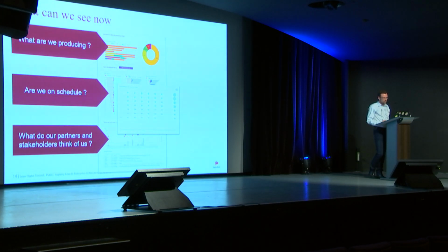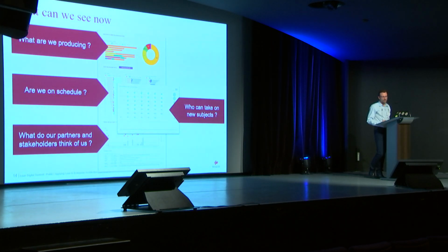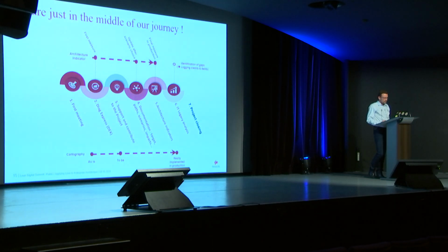We had a new feature, which is the availability of everyone in the team for the next 6 weeks. So we have another tool that helps us to choose the righteous architects that have the most time to spend on the new subjects. But with everything, we're just in the middle of the journey.